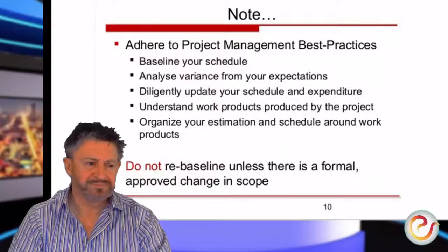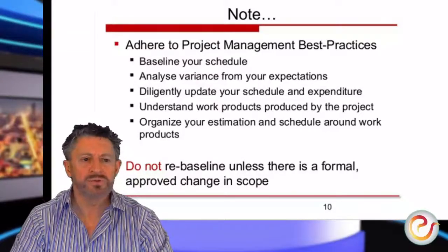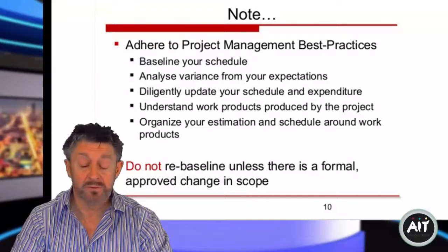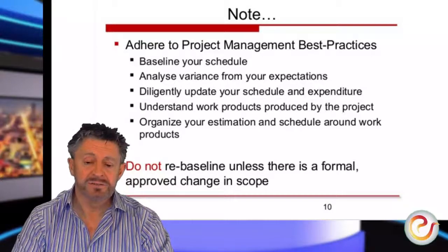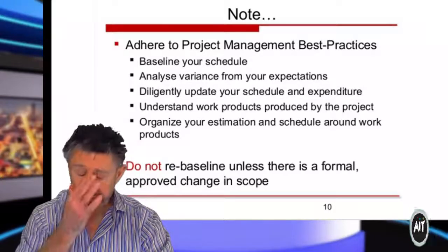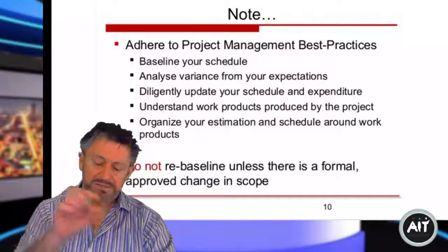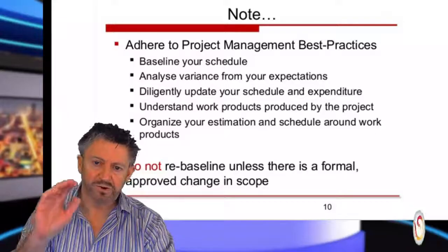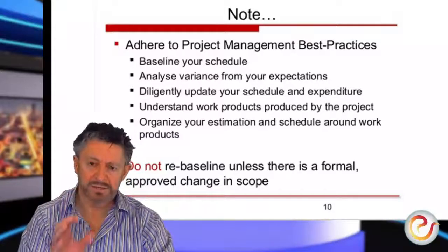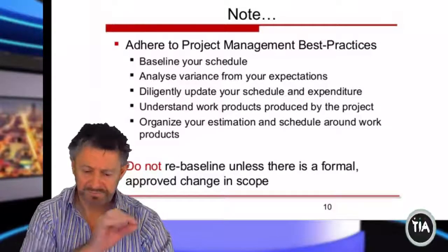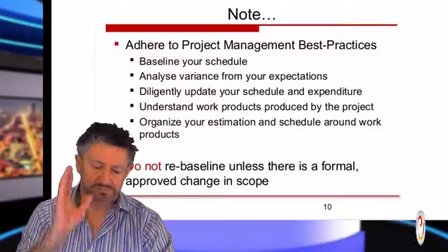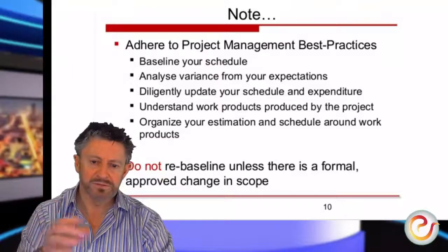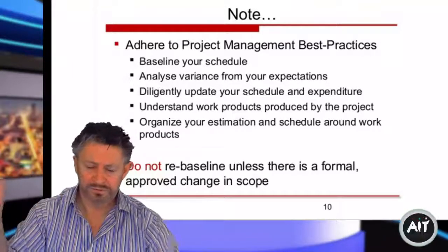So a note, being, adhere to project management best practices, of course. Baseline your schedule, and that's your basic plan. And how many activities, get your agreed project plan in place. That's your baseline. That's what we call this S-curve. Activities that need to be done accumulated over the total duration.